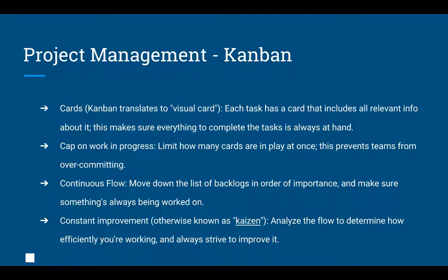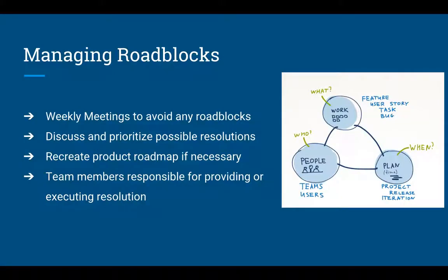The Kanban methodology helps us maintain a continuous flow, so we move down the list of backlogs in order of importance. So we can actually prioritize our tasks as well, make sure something's always being worked on, and like I said, if one person finishes their task sooner than the other, they can jump in and help the other person. And efficiently, it helps us get through our product development process.